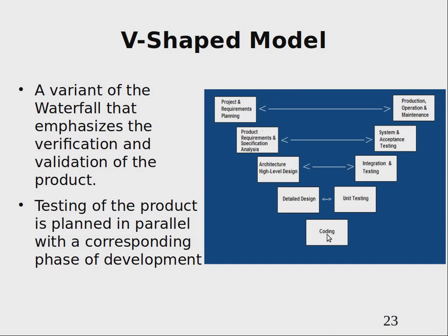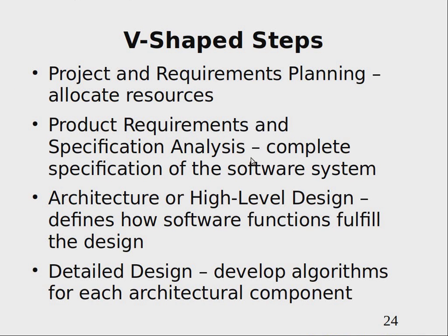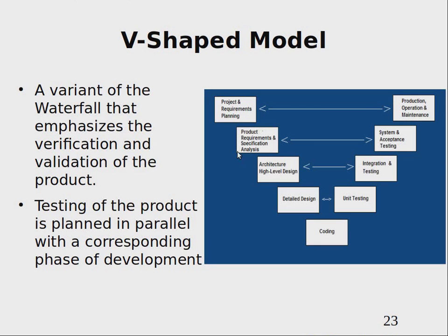You don't deal with a particular programming language or framework so closely. You start thinking about testing at the unit test level, integration test level, system level, and then maintenance. So this is an evolution of the waterfall model, and it is more detailed, and it shows very easily what your scope and abstraction should be.